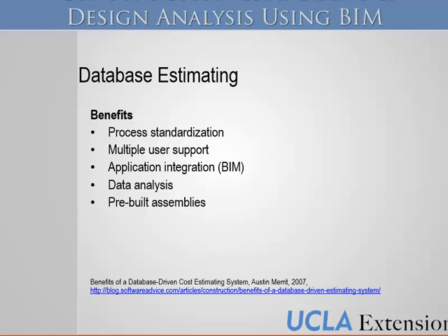It allows you to keep some quality control, but it also allows you to draw on historical data much more effectively and cleanly if everything's named in the same way. If you called concrete one thing or had some cost code associated with it and then it changed throughout each project because you just made it up as you went, it would be very difficult to say, what's my average concrete cost for the last 10 years on all my projects? You'd have to go to every single project and track down what that price was for that particular project.